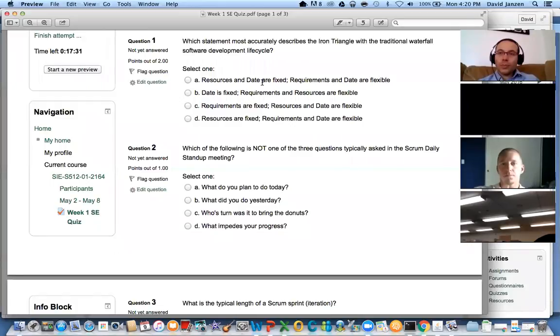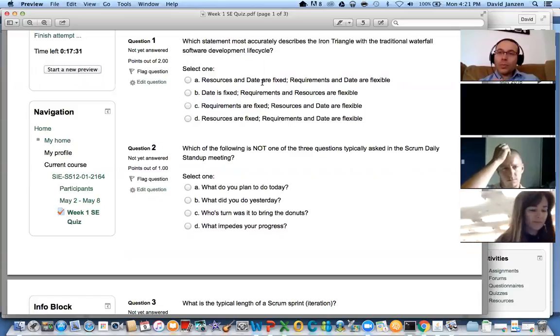it's going to take me time to get more detail. So I'm going to have to spend effort. So that's some of the balance. And so I suggested, hey, let's do this in an agile way. How about if I'll spend 20 hours a week for 1 week, and I'll do everything I can as fast as I can. And at the end of that week, you reassess, and you can adjust what you want me to work on, and I'll fix the amount of time.